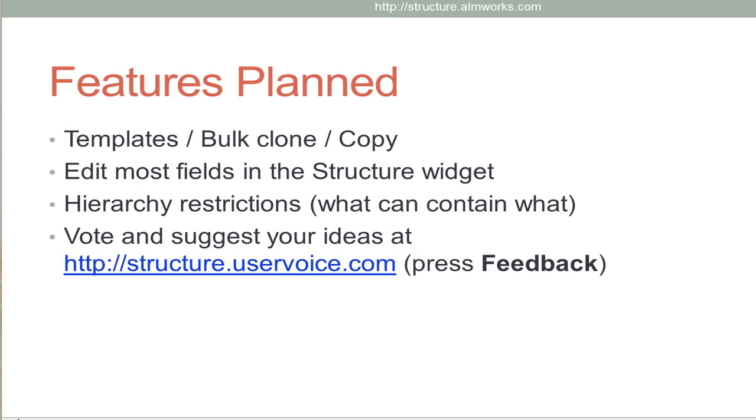Another popular request is that we will have most of the fields editable on the structure widget. So when you do planning, you will be able to immediately change fixed version, assignee, remaining estimate right on this structure board, and see the progress bar change and so on.